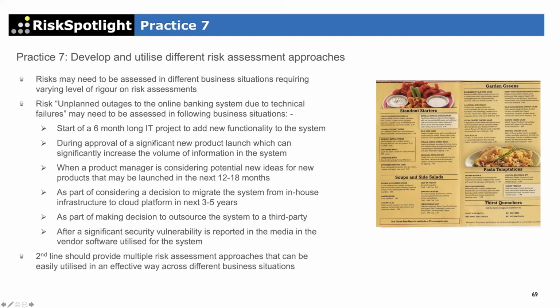Then, during approval of a significant new product launch, which can significantly increase the volume of information in the system, if somebody is launching a product and it is successful, it will bring so many customers that our online banking system may not be able to handle that extra volume. Then as part of that new product launch, they need to think about that one operational risk.